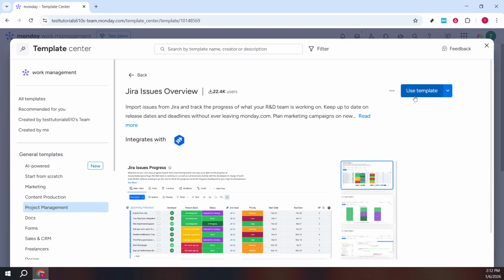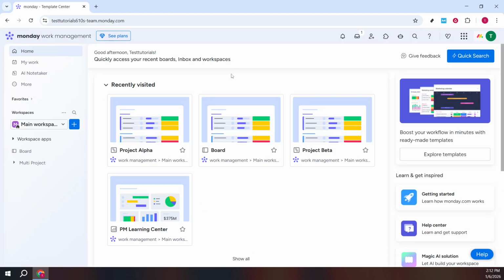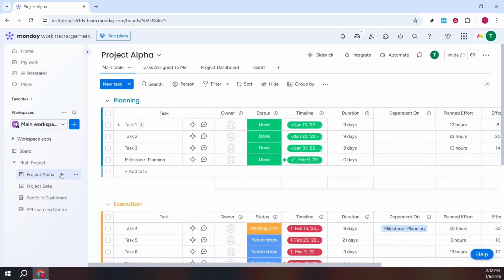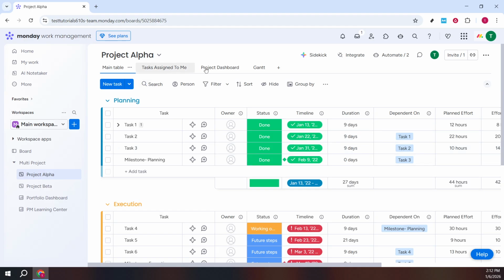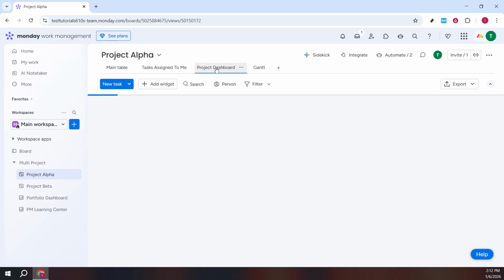You can confirm the workspace, adjust the board name to match your project, and choose whether to include sample items for inspiration. Once the board is created, make your edits. Rename groups to reflect your process, such as backlog, in progress, review, and delivered. Update statuses to mirror your design stages. Assign owners, set due dates, and attach briefs, brand assets, or design files directly to each item.